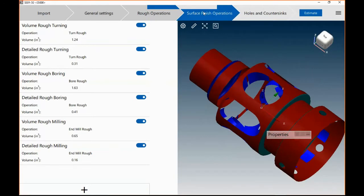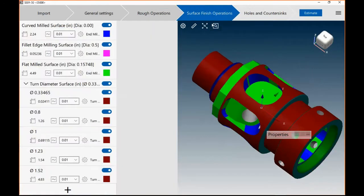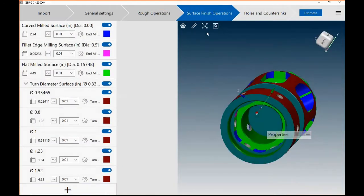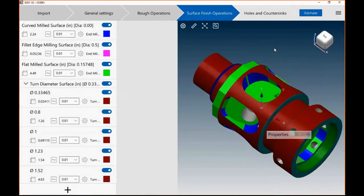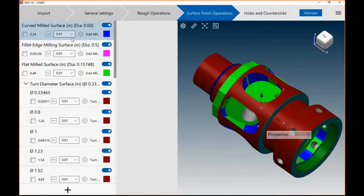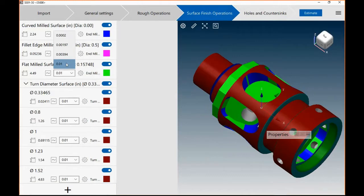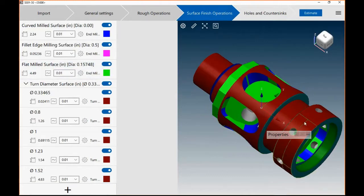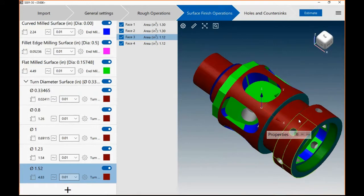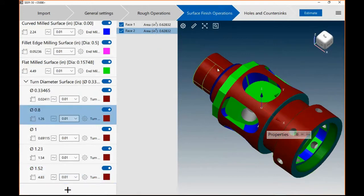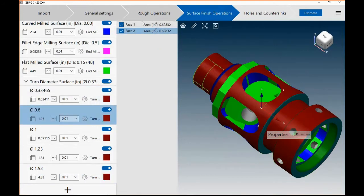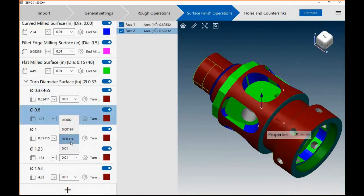When you get to the surface finish selections, you can go ahead and refine your estimate even further by applying such things as tolerances to these surfaces. Different manufacturing processes if you'd like to. If you've got a very tight tolerance associated with this area here, you just crank down the tolerance on that.